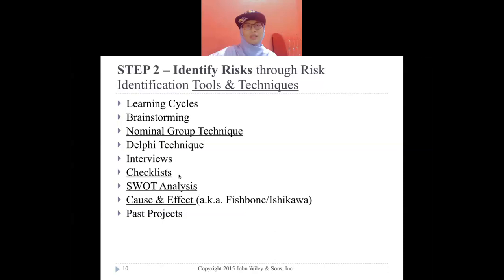And then the checklist, of course, maybe from the brainstorm or maybe based on the previous work. So the checklist you must check: is there any issue happening in these phases? No. Planning, no. Is there any happening in the analyze phase? No. In development, yes. We might have a shortage of resources.